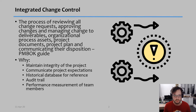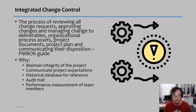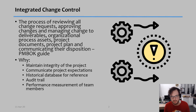The third aspect to remember is that we should maintain a historical database for reference. All the change requests that are made should be put into a register so that we can analyze it and keep it — this also provides a good audit trail to understand how the project went through. It's also a great way to measure performance, understanding which team members are contributing the most and why.